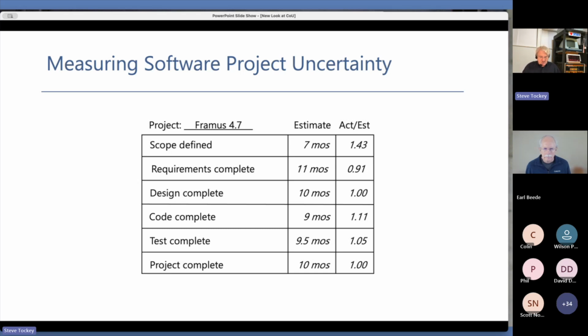So what I would suggest to start with: take all of my size-based projects and my time-based projects, run them independently, see the cone of uncertainty that comes out, and see if there's any difference. Literally run one set, run the other set, combine them, because it's really easy to combine the data. Just cut, paste, boom, and then see how different the time set, the size set, and the combined set are. See what the cone of uncertainty looks like when you run the data sliced and diced different ways. And if it doesn't matter, then throw it all into one set. I'm just not willing to say that's a wise thing to do to start with.